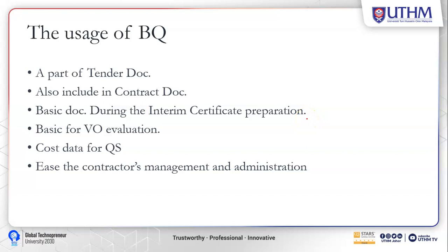The contractor will always refer to BQ before they can submit the necessary progress claim to the employer or the client.